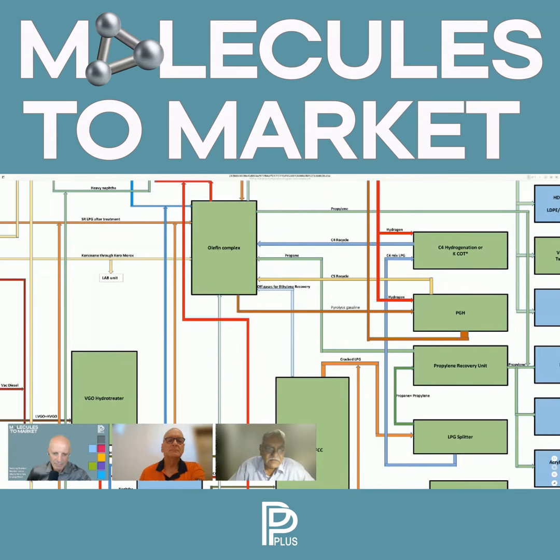And in our system, if we have to develop a feasibility report which has to be put up for prima facie clearance, our requirement is that for the total investment envisaged in the project, I should be able to generate a plus or minus 30% accuracy level of estimate. In your parlance, sometimes you call it level 1, level 2, level 3 kind of estimates. But we can say a plus or minus 30% level is required.